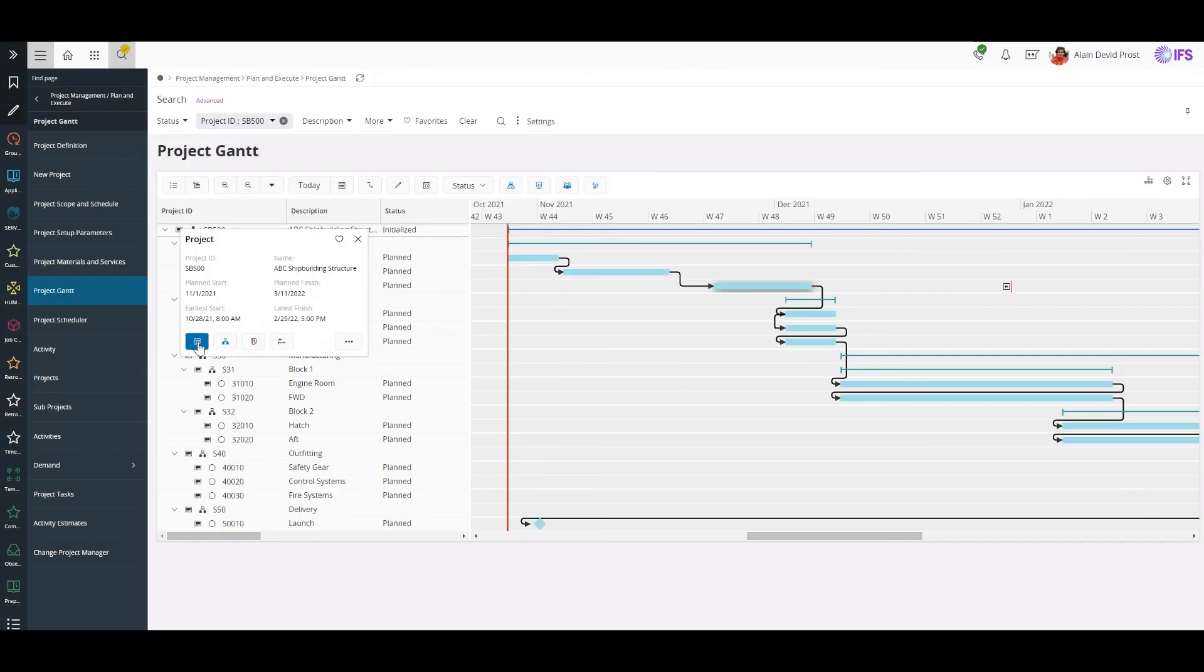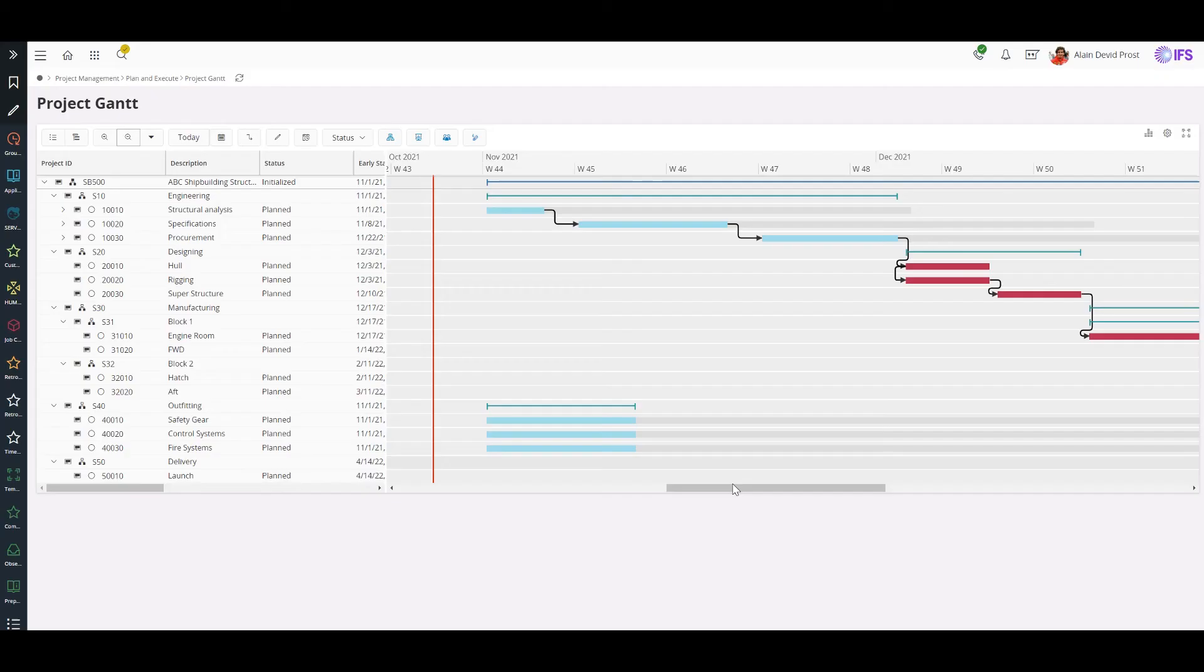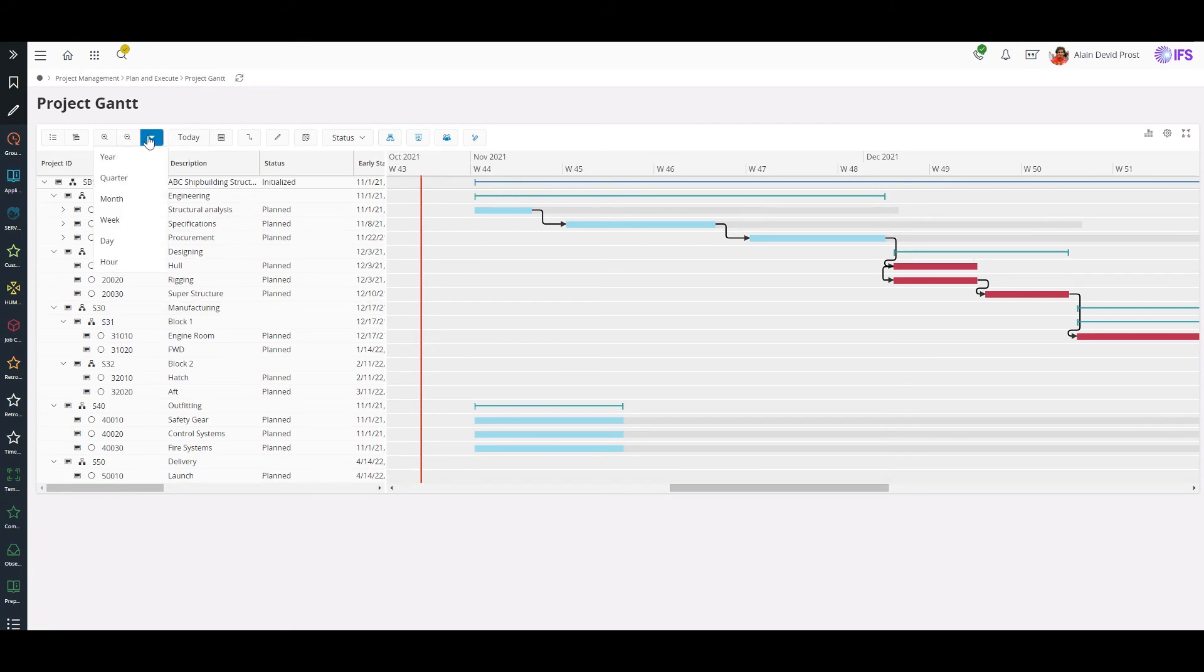Let's do a quick schedule to find out the possible completion date of the project. To see the project span at a glance in a single screen, I'll change the time scale to quarter view.